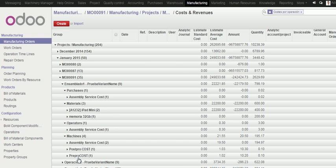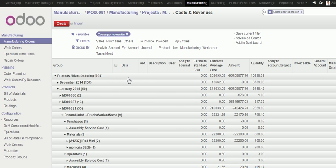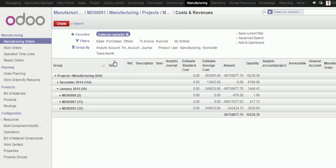So, I can have all the detailed cost estimated and real for each manufacturing order and the global cost collected into the project.